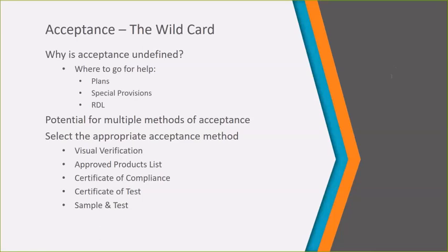Okay, Ashley. The acceptance method, yeah. The acceptance method is a test template that you're going to want to add on the test tab. So you'll have no fewer than 3 test methods, test templates on your test tab. You're going to have your universal material submission. You'll have your producer-supplier submission. And then in accordance with what's on your required documents list, you'll have your acceptance method. Does that help? Awesome. Thanks, Ashley.